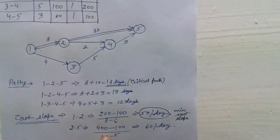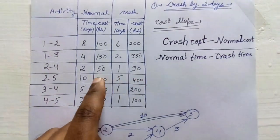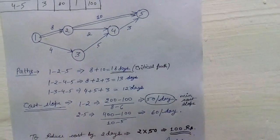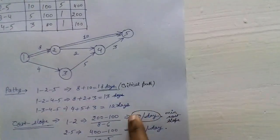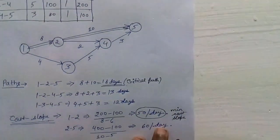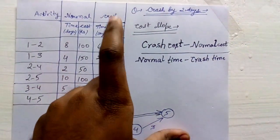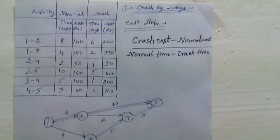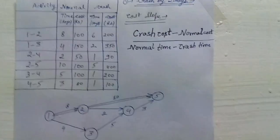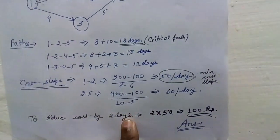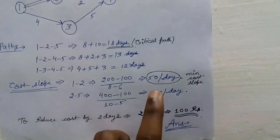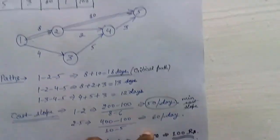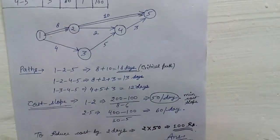The cost slope for activity 2-5 is 60 per day. Then you take the minimum cost slope, which is 50 per day. The question states the project can be crashed by a maximum of 2 days. So the additional crashing cost is 2 × 50 = 100 rupees. This means you need to bear 100 rupees extra to complete the project in 16 days instead of 18.